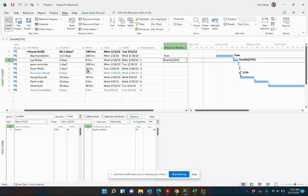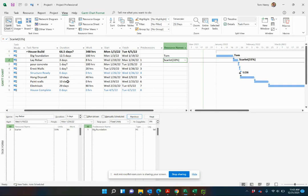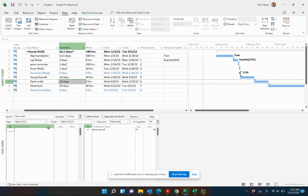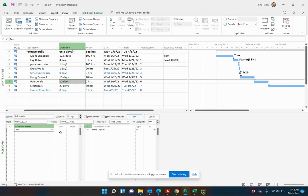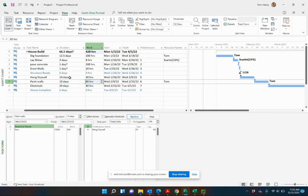Let's take another example. Paint the walls. We have not estimated a work effort for this one. When I assign a resource, let's put Tom on that one, by default it's going to be 100% units full-time. Boom, 80 hours. Full-time, 80 hours, two weeks, 40 hours a week.